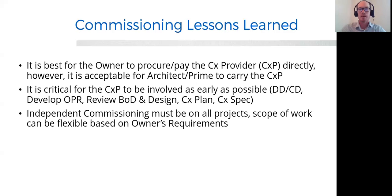I'll give you an example. We had a project in which there was close to 100 different rooftop units on a building, and that's the way the design was. Out of close to 100, I think it was 90 and change, about 18 of them had one issue or another from the manufacturer. I'm not talking small things. I'm talking compressors wouldn't stage, outside air dampers wouldn't function. They were showing 0%, closed, but there was about 20% of that vane or damper open, exhaust issues, all kinds of problems, right?